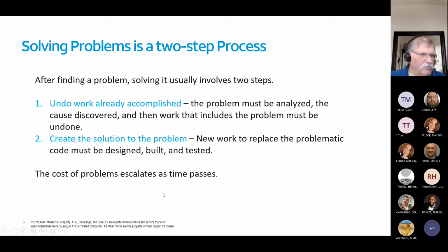So the longer it takes to find problems, the longer it takes to fix them and get everything back in working order, which really increases the cost. Another thing to consider is that if you can find problems earlier in your development cycle, the earliest part of it, they are so much easier and cheaper to fix than if you let things go until they're deployed and then try to fix them. Okay, because there's less rework. And that's one of the reasons why we do iterative development too.